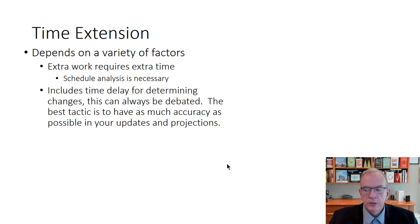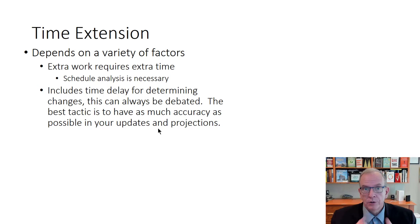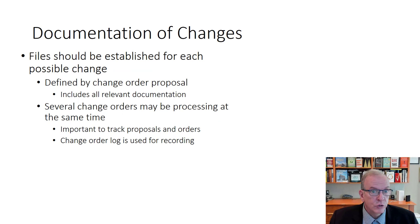Changes are going to affect your ability to do the project in a timely fashion and have an impact on how effectively you can come in within a certain timeframe. You've got to do some analysis, insert activities into the schedule, and see the impact on the schedule to fully appreciate it. There's a critical path to your schedule, and if things are landing on that critical path, it's either going to extend your schedule or you're going to be working overtime and weekends. Did you price your changes to include those costs?